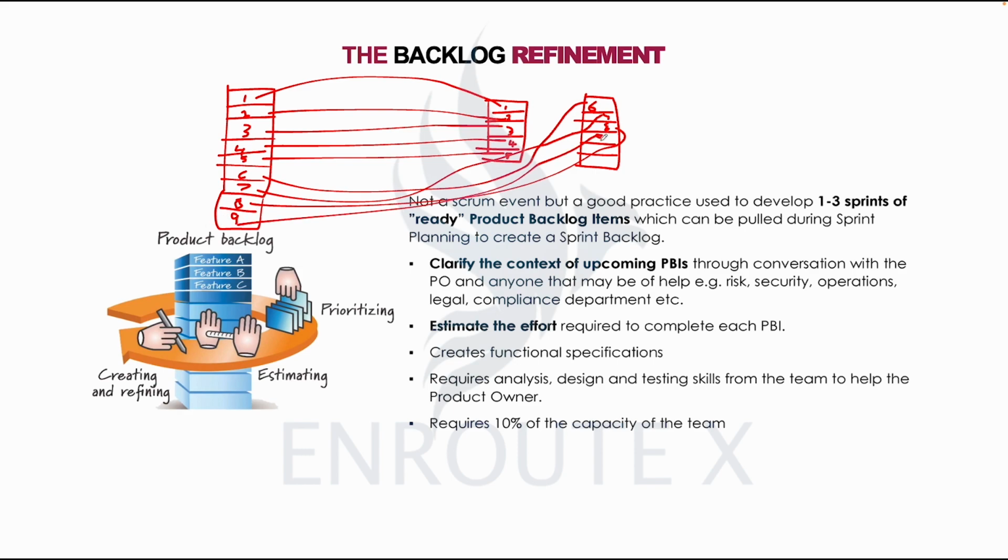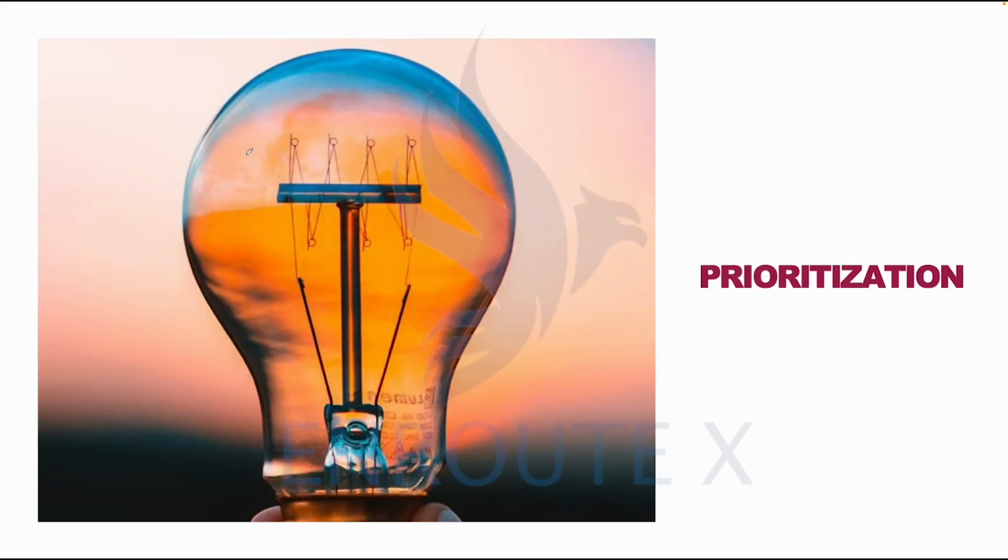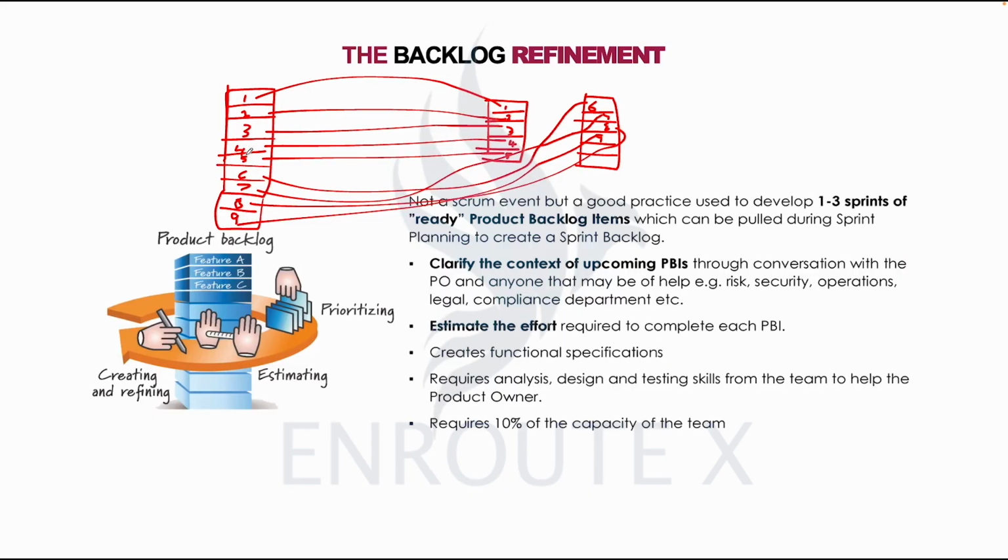So what we're doing is preparing the stories or the work items in the product backlog and ensuring that such meet the definition of ready before we actually get to that particular sprint.